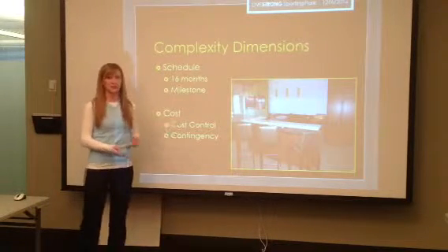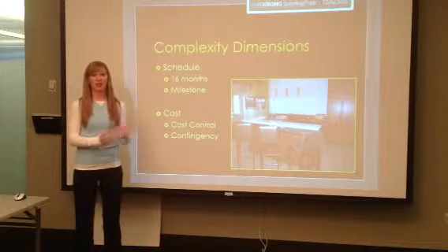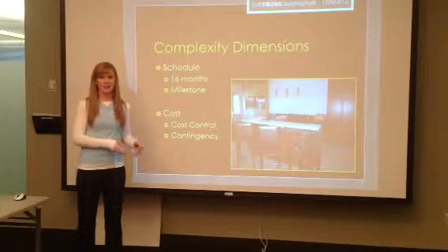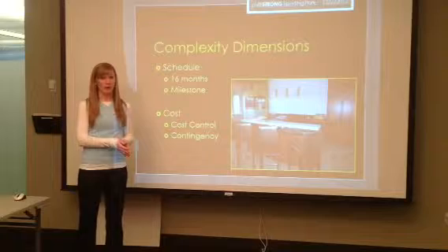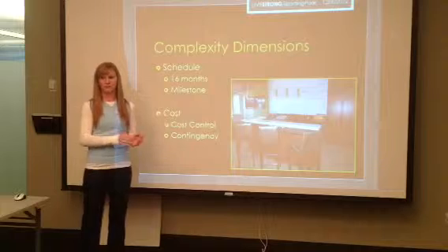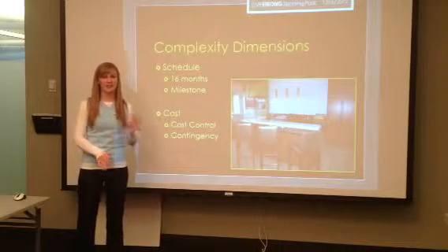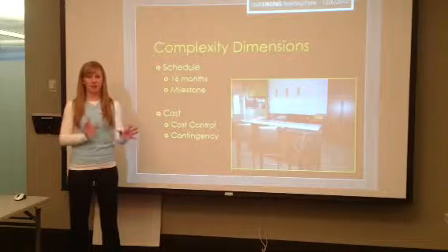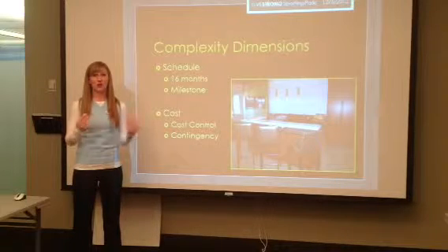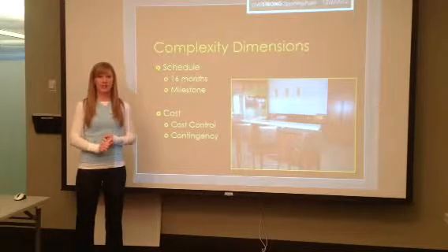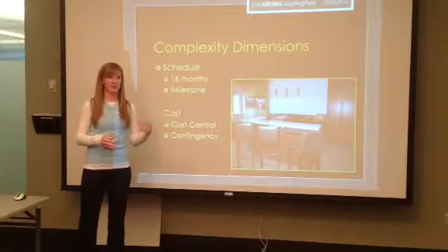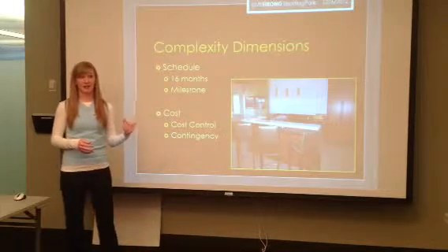Moving on to our cost control, the good thing is Turner was brought on early for pre-construction. So we've been working with Populous and the owner on estimates from DD development through 25% CDs, 75% CDs, all the way through construction documents to build off of. We had estimates to compare to, we had sub-input, we had logs to compare to, everything. We also had an owner contingency and a construction contingency, which we tracked, and we showed different PCO reports, COR reports, and contingency reports to the owner every week, and they themselves tracked all the changes and dollar values as well.